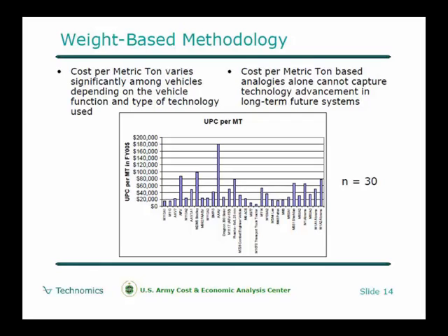Now these are some real slides that we're borrowing from the Army for this briefing, but just looking at a weight-based methodology. So I'm looking at weight, I'm looking at a bunch of historical data points, and I'm trying to make an estimate on the relationship between weight and cost in this case.